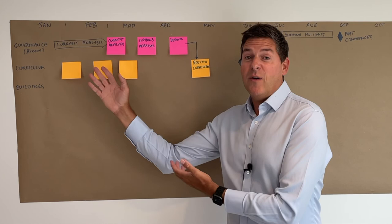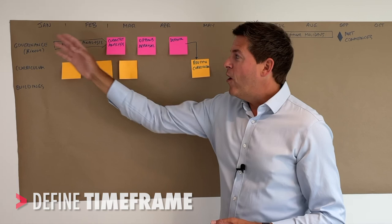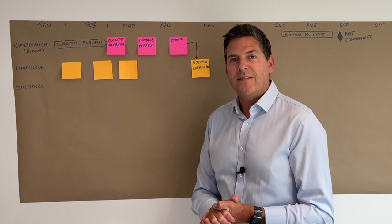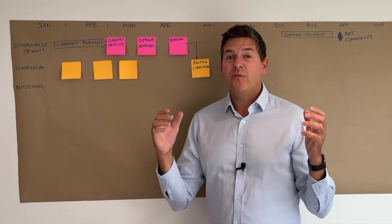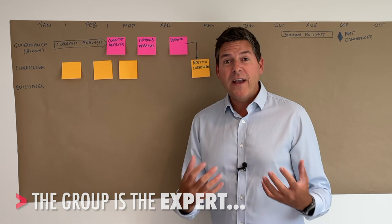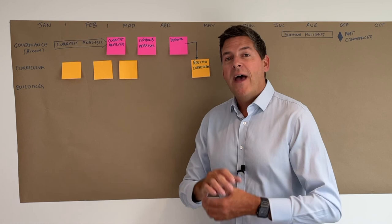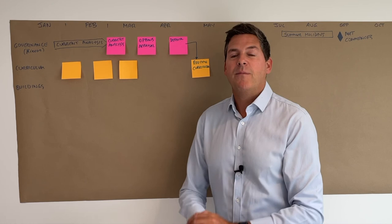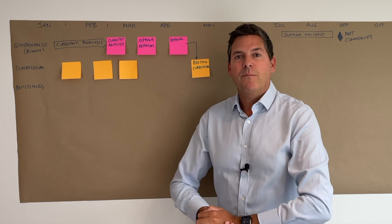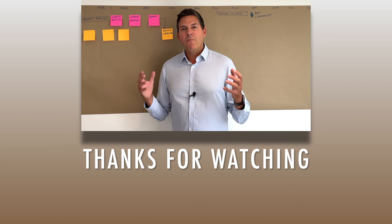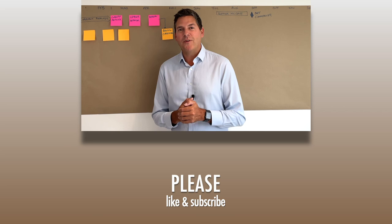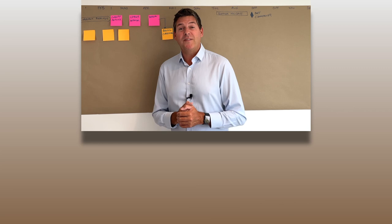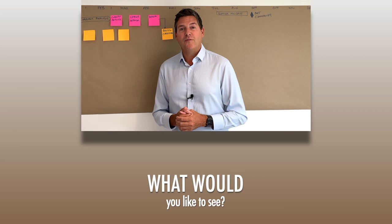So there we are — brown paper project planning. Start with your brown paper or whiteboard, give yourself a timeline across the top, work out the work streams with the group, then get the group telling you what needs to happen under each one. The power of the facilitator is that the group is the expert — they bring the content, you guide the process. They tell you what needs to happen, how long it'll take, and who's best to do it. Your job is to keep guiding them and keep focused on each work stream until it's done before moving to the next. If you liked this video, please like and subscribe, and add a comment if you want us to look at your challenge.